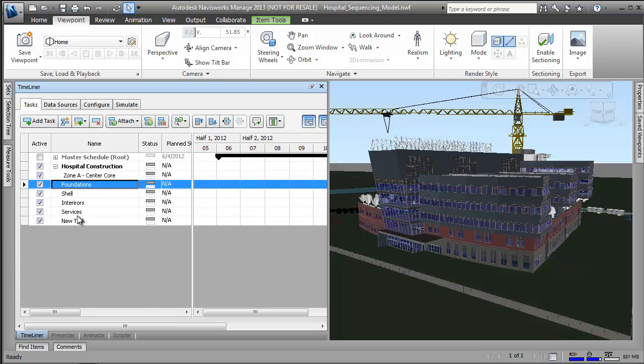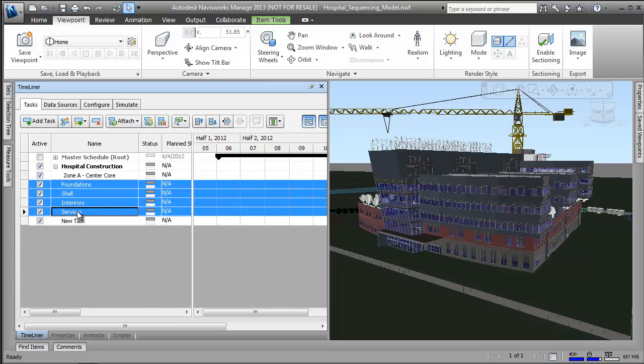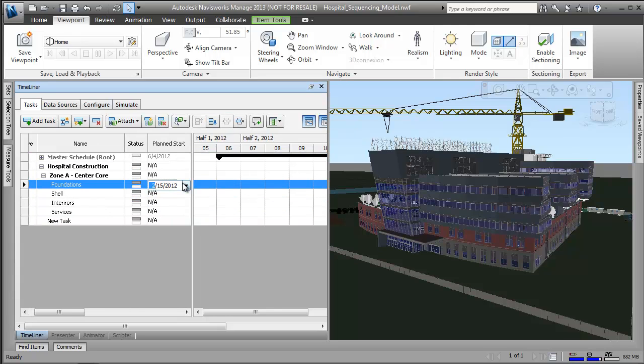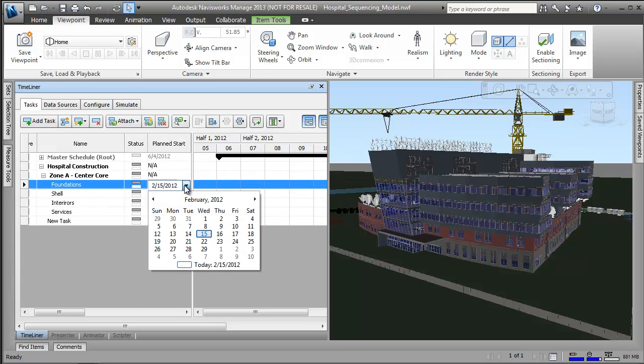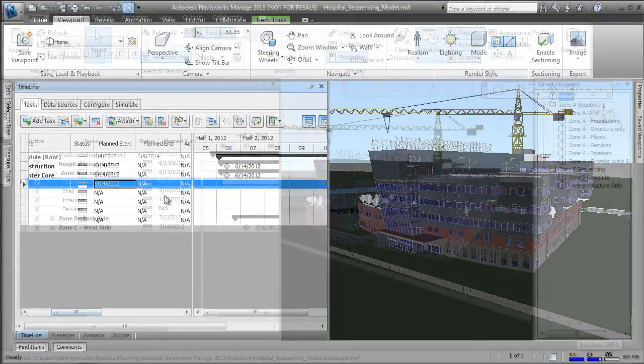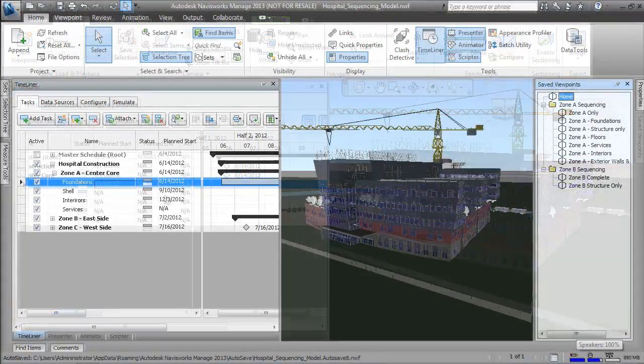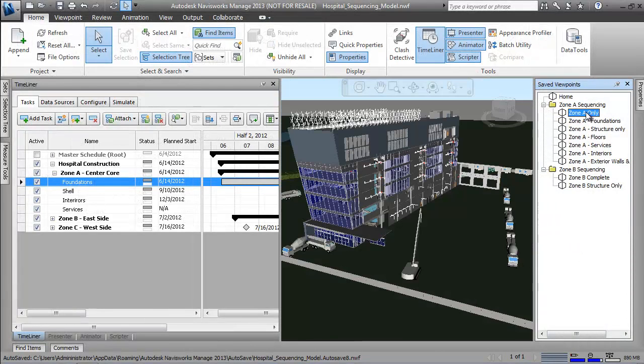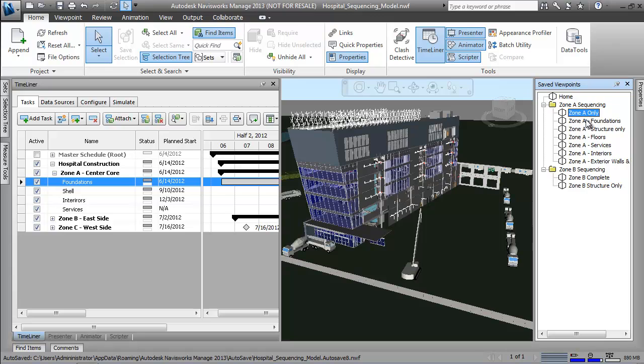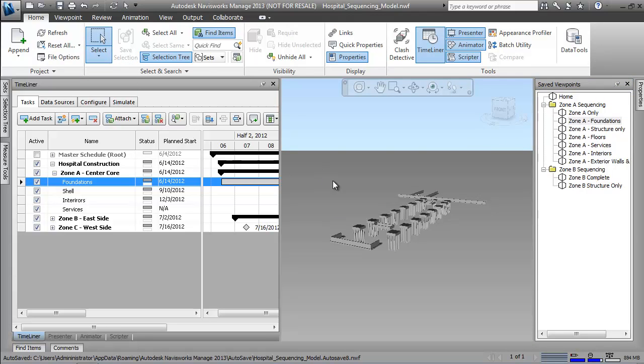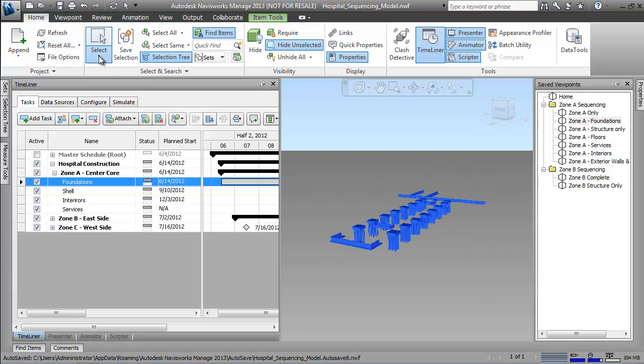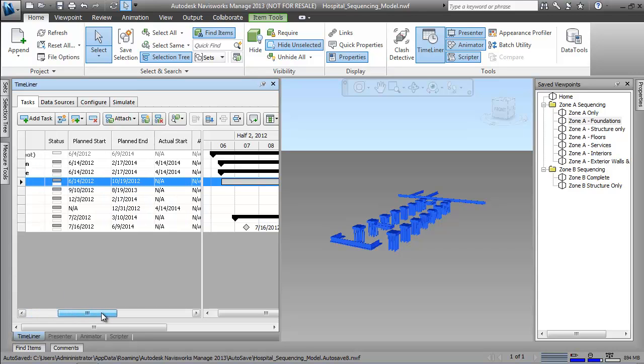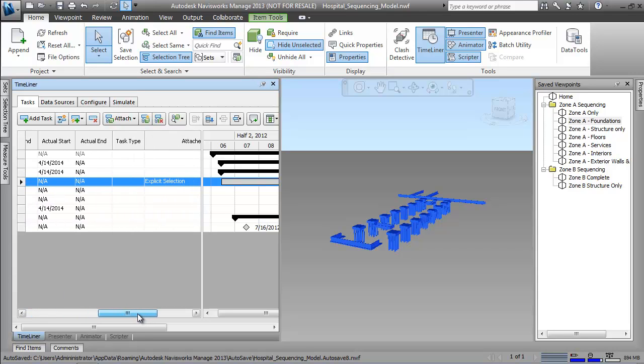Historically, scheduling and logistics has been a big problem for many companies. Schedules that are out of date almost the minute they are printed are nailed on job site trailers. They utilize bar charts that fail to show how or why certain construction activities are linked in a given sequence and do not capture the spatial components related to these activities. The Autodesk Construction Solution supports workflows for creating project activities based on your categorization of the design data which can be used to ensure the correct order of events producing a skeleton schedule.